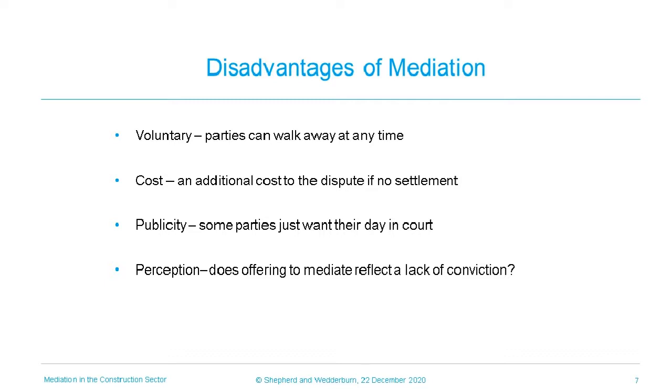The defendant in Reid v Buckinghamshire Healthcare NHS Trust was ordered to pay the costs of the claimant from the date on which they had received the offer to mediate, which they then unreasonably refused. Although this has been interpreted as the first step towards mandatory mediation, the only concrete difference is that parties in England should now be prepared to justify their reasoning at a later point in time.